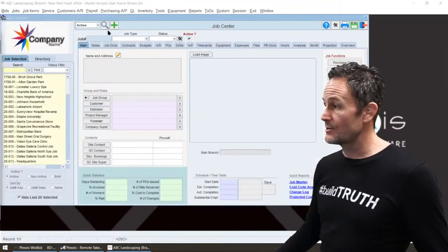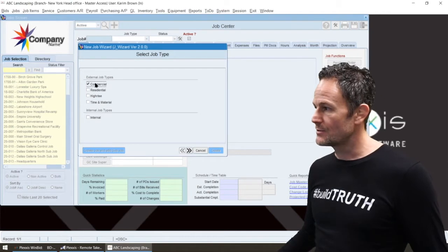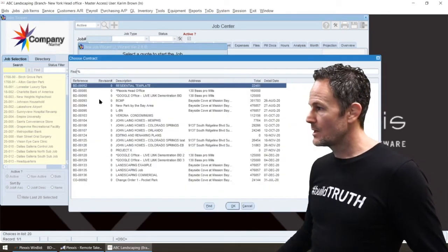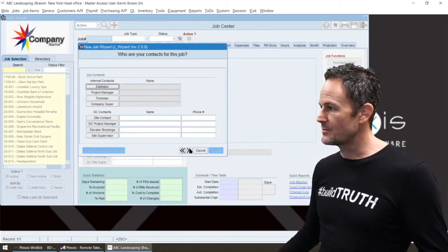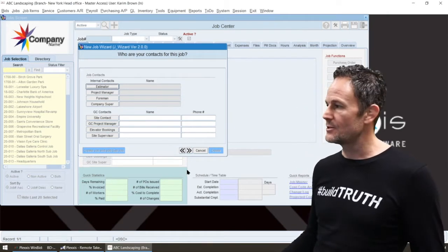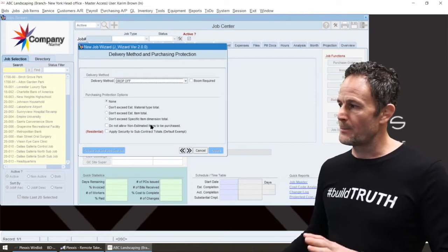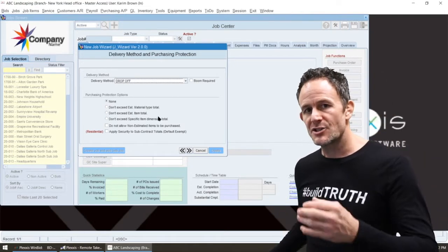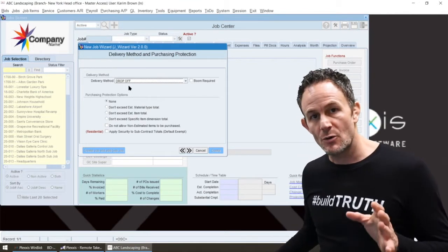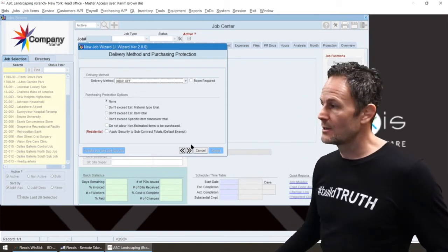And let's start up a job. I'm going to bring in a landscaping job. Plexxis is multi-trade, so in this example, we're just going to use landscaping. And we're going to pick it. It's going to bring in some high-level totals. Now, if you don't know this information at the time, you don't need to fill it out. You can always go through the quick edit screen later. Because we bring in bids and work at such a granular level, we have the ability to set up notifications if somebody tries to go over quantities on a buy item basis or outside of the budget.